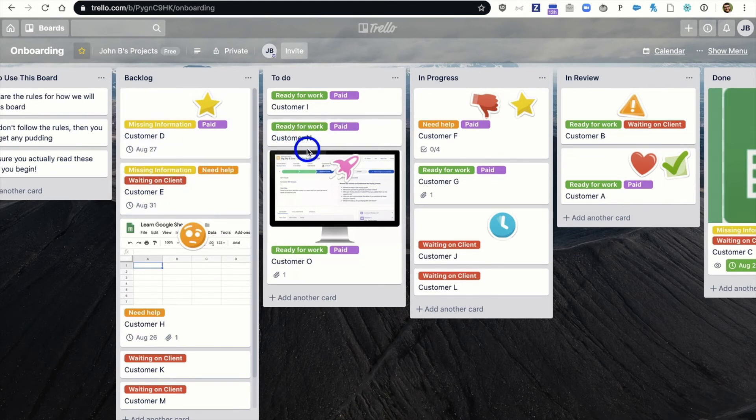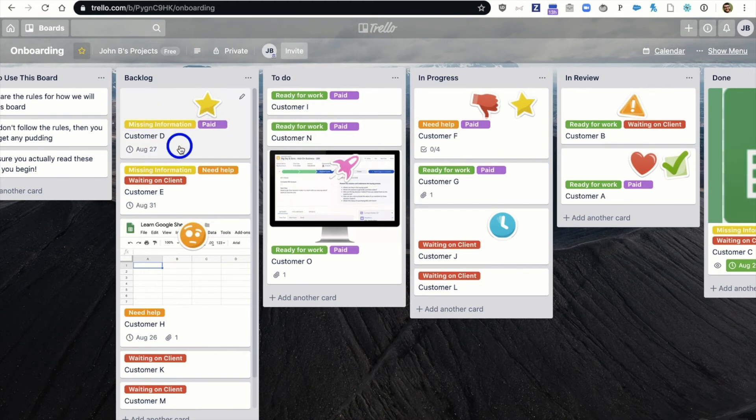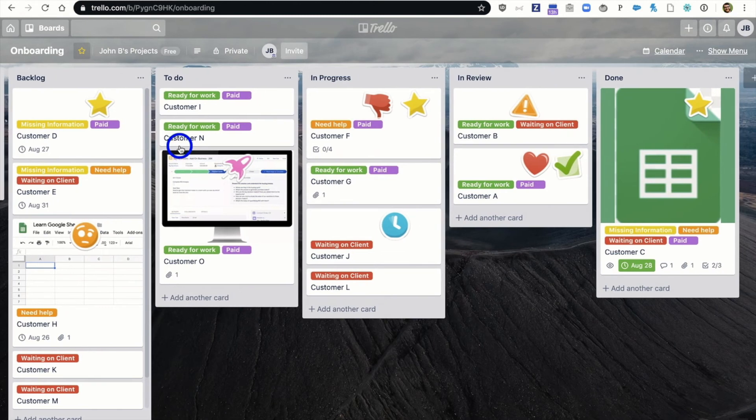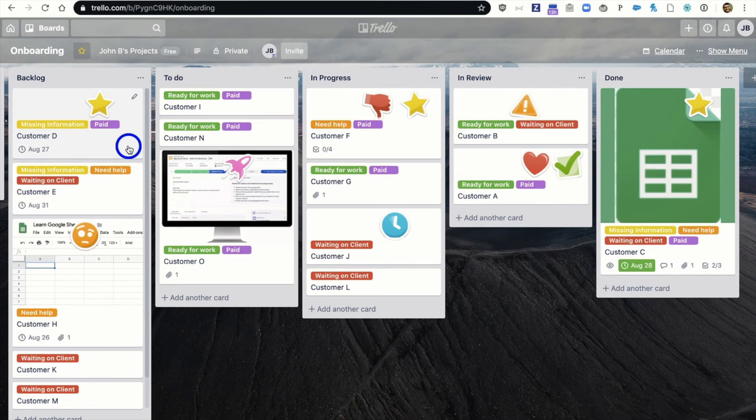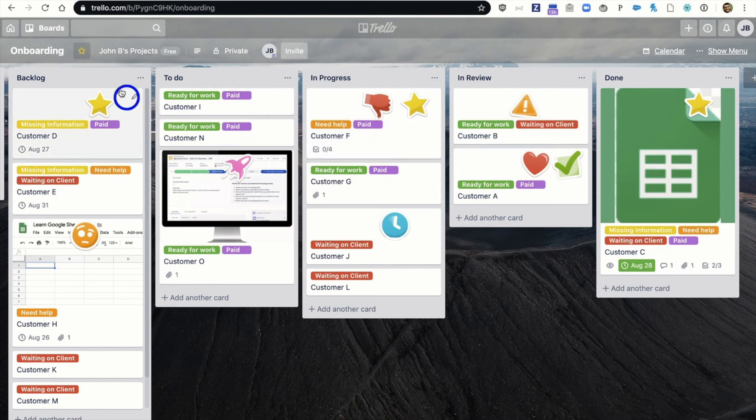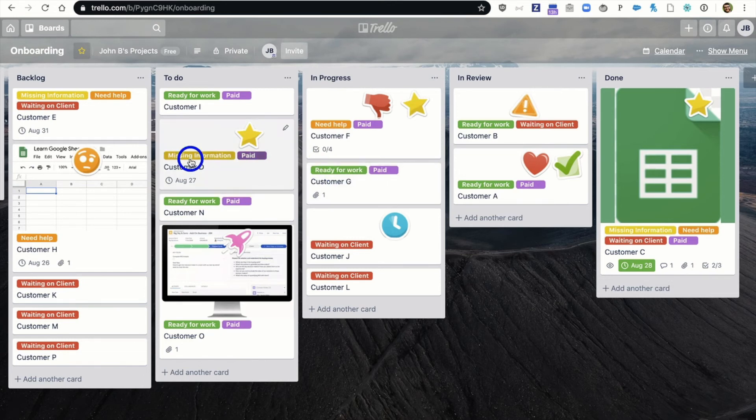Because it's important that you know when you can start working on something. Imagine this sort of like a traffic light system. You want to make sure that you're only working on things that are ready to work. Because if you do work on something that is not ready to work and is still missing information, you might do something wrong. And what that can do is actually double your workload. Because maybe a customer gets back to you and that thing you thought was actually XYZ is really ABC. And you know what that means? You have to go back and redo everything you just did, but you have to do it a different way. That essentially doubles your workload, folks. So Kanban is great at making sure you're only working on those things you need to work on. And this is the Kanban system. Forgive me, I should have mentioned that each one of these lists essentially is the Kanban system. Because you can just take something and move it into the list so that you know exactly what you need to do next.